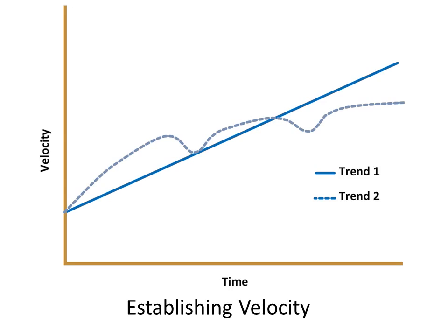Now, talking of velocity, what is that? How do you measure velocity? Obviously the burn down for the first sprint is not going to be the same as the sprints moving forward. However, it has been seen that after a certain number of sprints, usually 3, the team reaches optimal velocity and continues with that sprint after sprint, like how it's shown in trend 2. There was a little higher, then a little lower, and then finally it tapers off to a certain velocity over time.